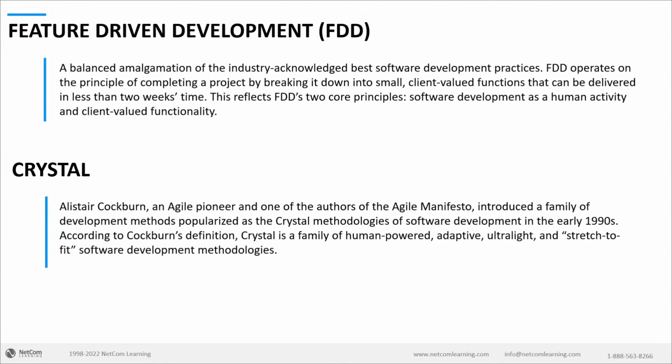Another technique, feature-driven development. A balancing act of the industry acknowledged best software development practice. FDD operates on the principle of completing a project by breaking it down into small client valued functions, features that can be delivered in less than 2 weeks time. So the entire team focuses on one feature at a time, completes it, moves to the next one.